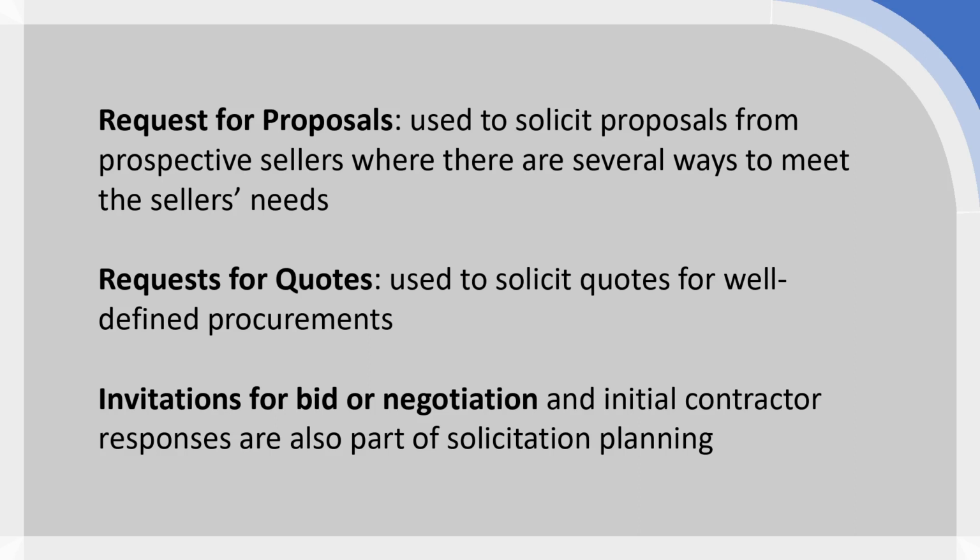So you're prepared to hear proposals to achieve that outcome from various different sellers. You're not mandating the exact execution or the exact conformance specification, but rather you have a performance specification or an outcome specification. You want to understand what the different methods of achieving the satisfaction of your procurement need are, and you're willing to really hear the expertise represented by different suppliers and evaluate different proposals.